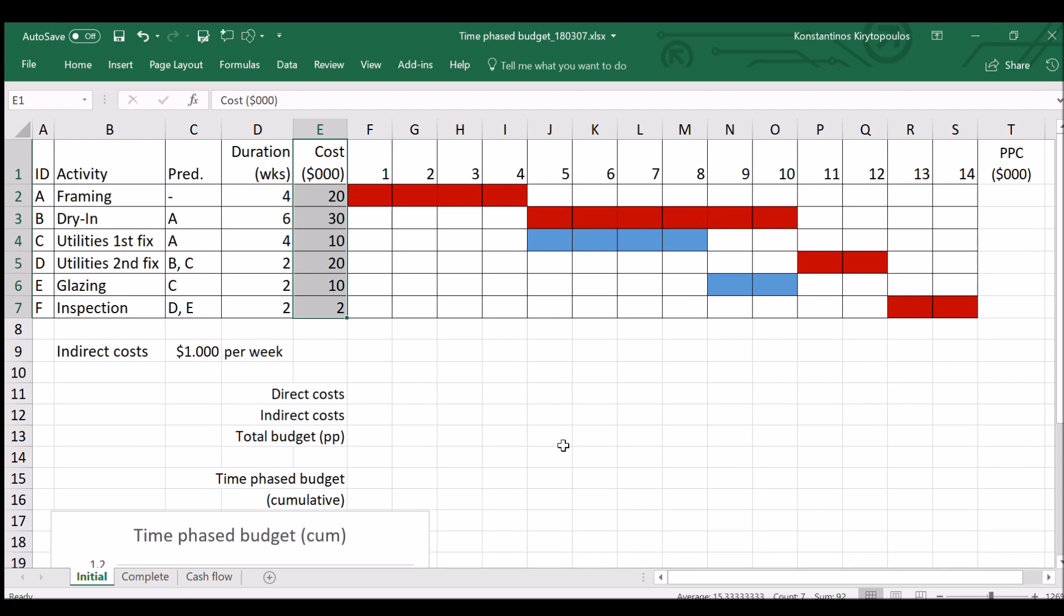And what you want to do is to have an idea of the development of the expenses during time. The first thing that one should do is to find what we call PPC, which is the per-period cost. Obviously the per-period cost is going to be equal to the total cost over the duration.